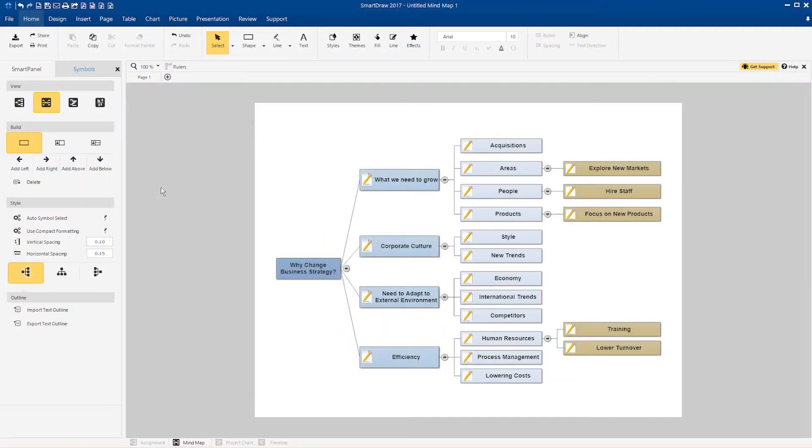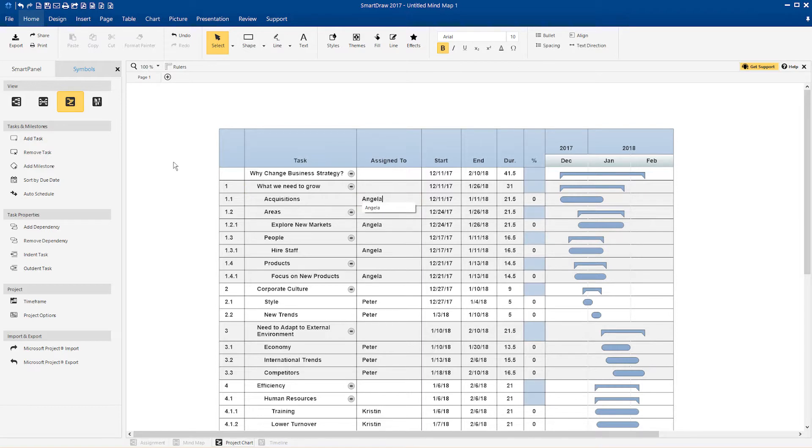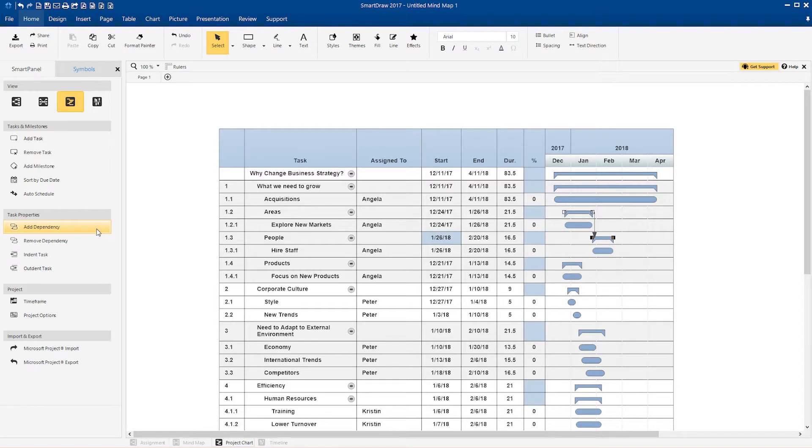With SmartRAW, your strategic plan can instantly become a working project plan. Assign action items to team members. Add milestones and due dates. Make the start of one task dependent upon the completion of another.